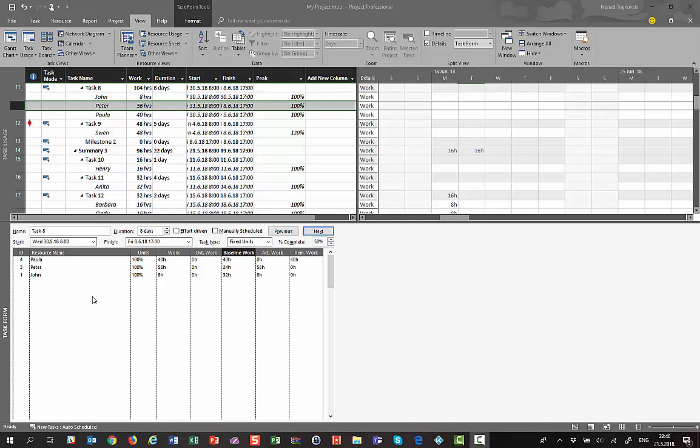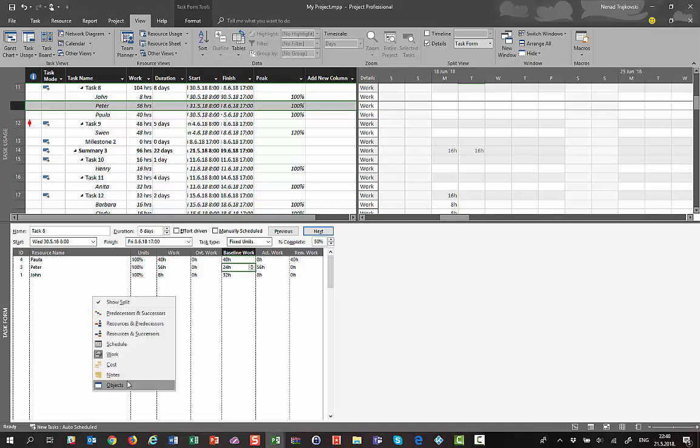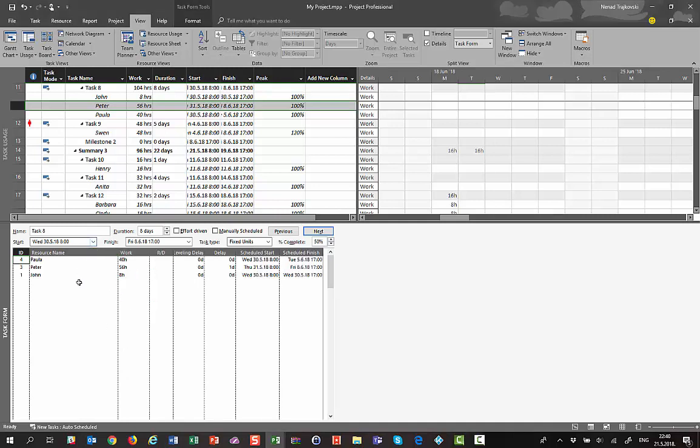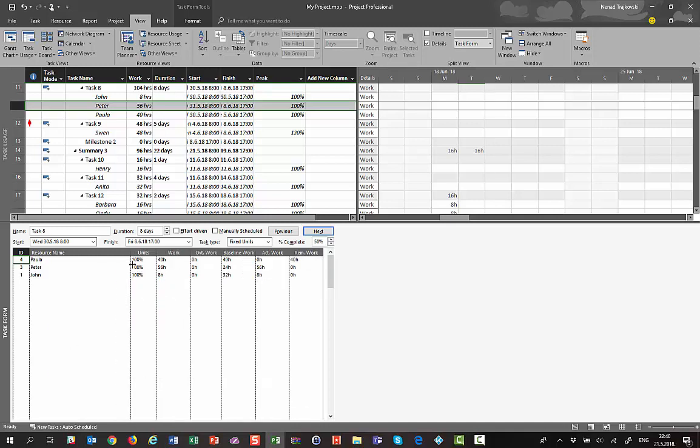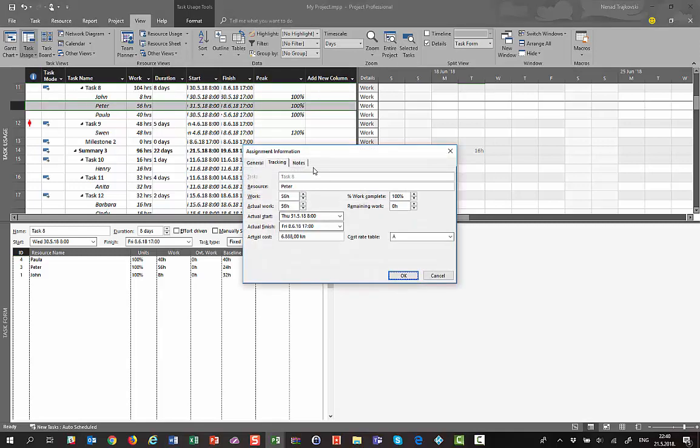Not everything, though. For some things you must switch to the schedule screen, in which you can put schedule start and schedule finish and delay, or the work screen, in which you can put units and work, see baseline work, and put actual work. Sometimes, for some additional things, you will need to use resource usage or task usage with task tracking, but anyway, it is very powerful.